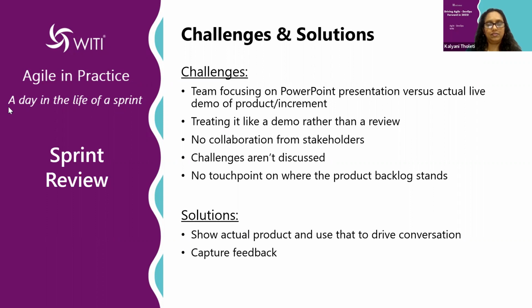In addition, for the demo, you shouldn't wait until the very end of the sprint to demo and get feedback. It should be continuous, I think, Mica, you had mentioned, as we call them the 3 Amigos. As soon as a story gets developed and tested, the product owner will sit with the team and the development tester working on that story, and say it met my acceptance. They're demoing that in the development environment, and say that looks good. So you're building quality into the product early by vetting it before it even gets pushed into the QA environment for QA to do the verification.